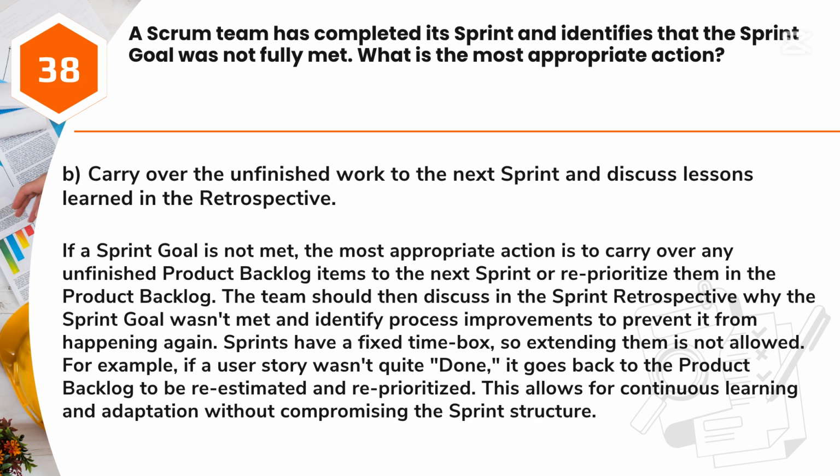Sprints have a fixed time box, so extending them is not allowed. For example, if a user story wasn't quite done, it goes back to the product backlog to be re-estimated and reprioritized. This allows for continuous learning and adaptation without compromising the sprint structure.